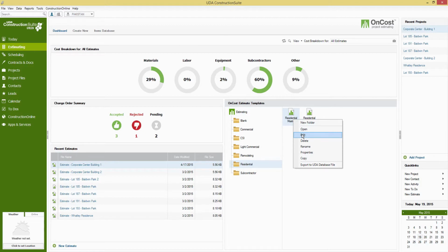new job. Now what that's going to allow you to do is really save as much information into your templates as you would like. As we'll see in a second, you can save everything from the basic structure of your job, your categories, subcategories, individual items, all the way down to your quantities, your costs, resources that you might typically use for individual components of your jobs. If you use the same vendor, same subs, you'll be able to save those. Whatever information you need for the most part, you'll be able to save into these templates to eliminate as much duplication of effort as possible.